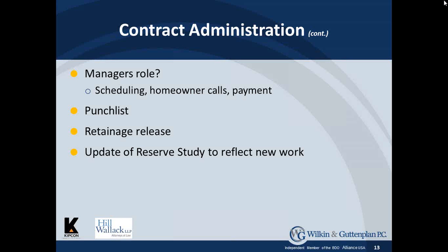And the last thing I'll mention is to keep in mind that when the job is done, your reserve study should be updated to reflect the new work, and now the work and the cost of the work is being amortized over the full useful life rather than a reduced useful life, because it's a brand new component that's been installed. So that's my presentation.